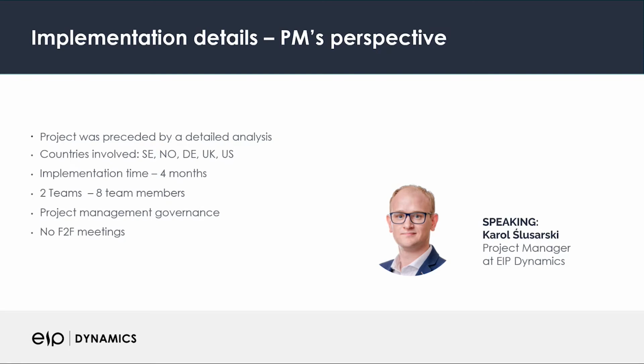A few more facts about the project: we built around 400 test cases for each country, which our team initially ran, and then the customer followed the same test cases to verify whether the system fit the necessary requirements. And during this project, we developed 16 different interfaces.